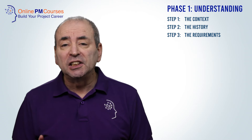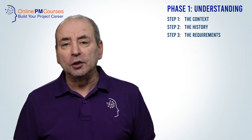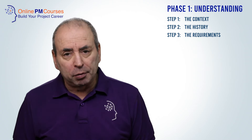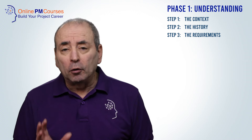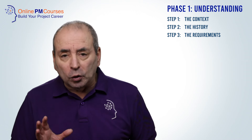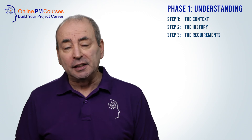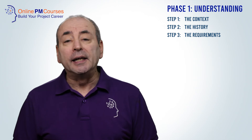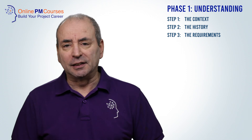Step three is to understand the requirements. Do your research on what your stakeholders need, what they want, what their priorities are, and what their preferences are. Also look at the possible impact of differing priorities amongst your stakeholders — these can cause conflict that can lead to changes in the specification down the line. This is therefore a source of risk and needs to figure in your estimates, particularly in the contingencies that you allocate.